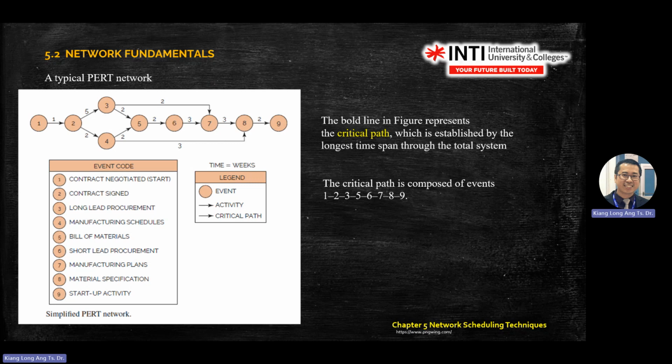Second, you look at the Rubik's cube, the 6 box. You look at the middle part. If it has the same number, then that is a critical path member. Or the third method, also referring to the 6 box: you look at the back one, EF equal to LF.